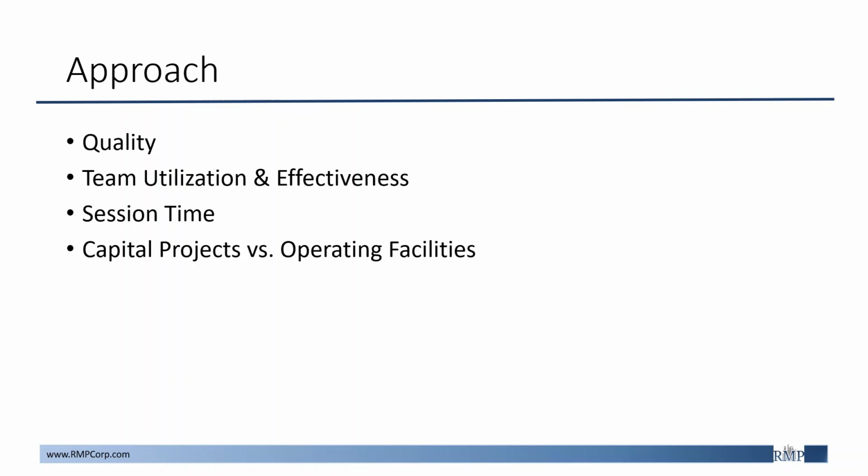In the earlier stages of capital projects, the focus is more likely to be on higher consequence scenarios in order to support decisions regarding fundamental design issues. These design details and process safety information are often not fully available. Now, in the later stages of the projects, they will have more design information accessible, and the focus of the project will now shift towards finalizing and vetting those design details.